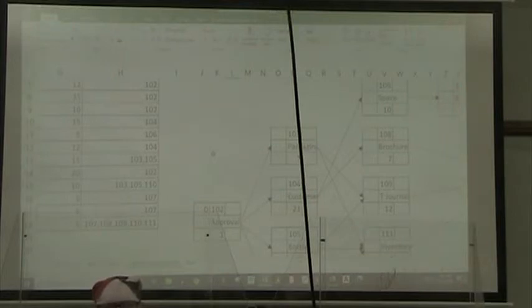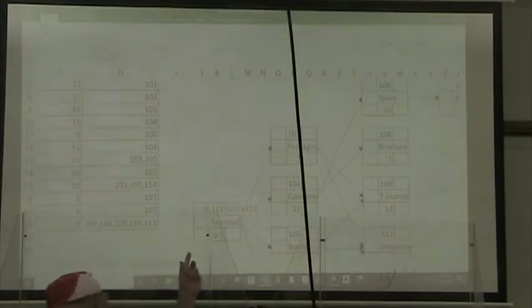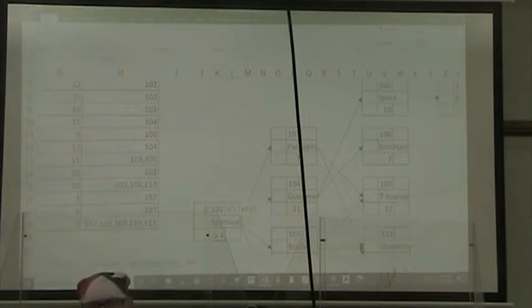which means that our early finish time is going to be equal to our early start time plus our duration, right? Now you'll notice that I've gone ahead and coded that into the Excel diagram.